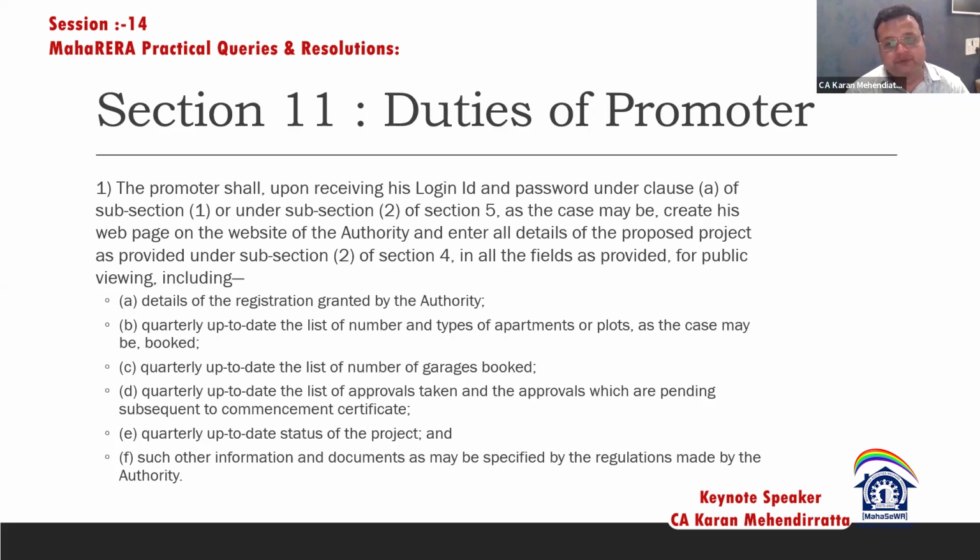So you have to guide him that even though Form 4 can be uploaded and you can get the acceptance, the quarterly compliance obligation is still on the promoter and he has to fulfill it, even though he is doing it at a later stage.